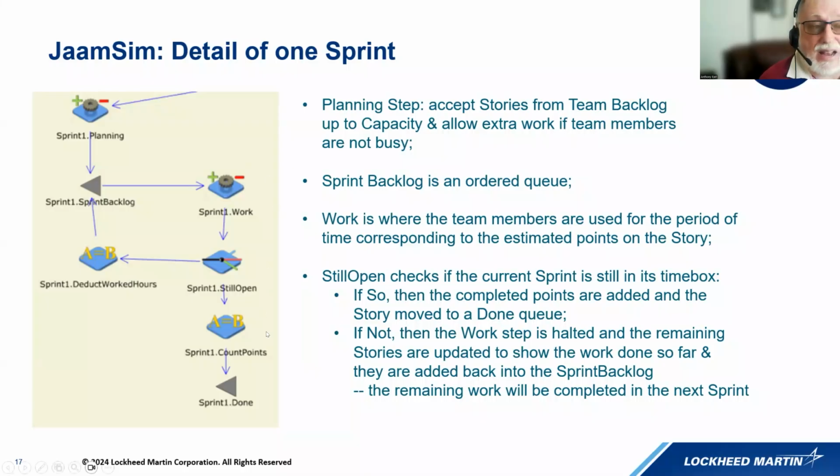So according to the way Agile measures, I'll say measures outcomes, not so much productivity, a team's velocity is how many points it finished during a period. So now that team member only contributed 3 points. If that combination happens for everyone on the team, they started with 3-point stories followed by 8-point stories, you're going to have 5 times 3 is 15 points for that sprint, which is very unlikely. But then in the next sprint, it's going to be much higher. So the average velocity is going to stay pretty much the same. It is the same for all the teams.